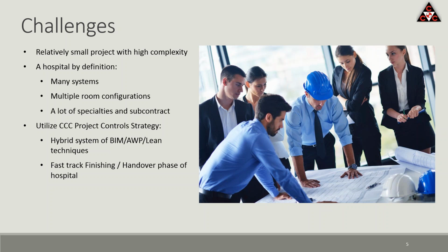The structure wasn't a problem. The problem was in finishing the project on time, the fast track finishing and handover. And if you know something about hospitals, the hospital will only order the major equipment very late in the project duration because they want to get the latest models. And so the coordination with the subcontractors becomes hard.